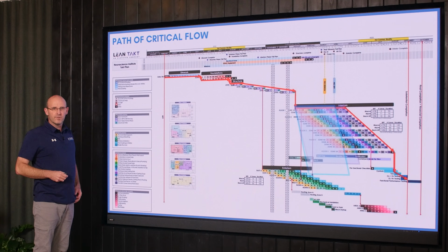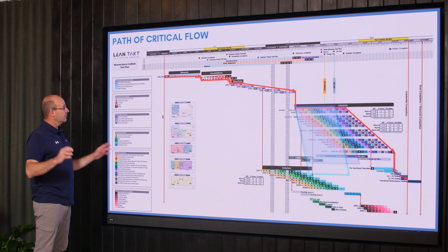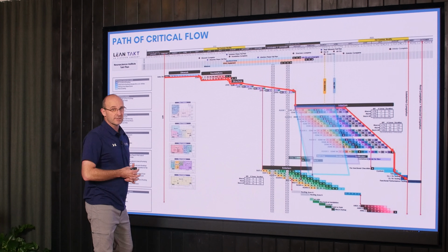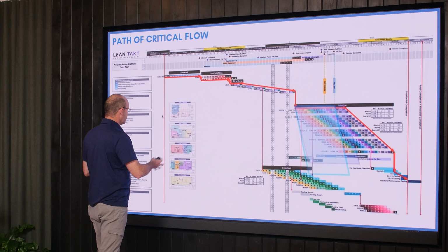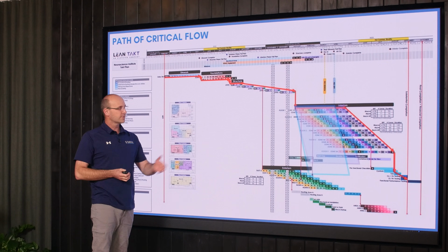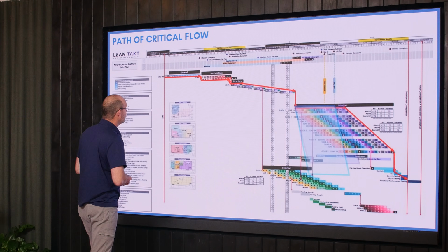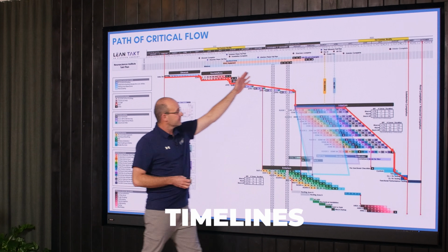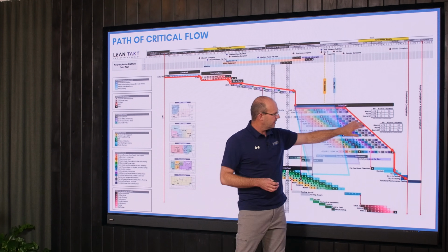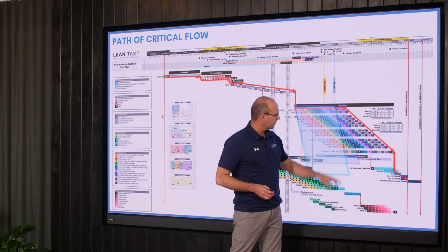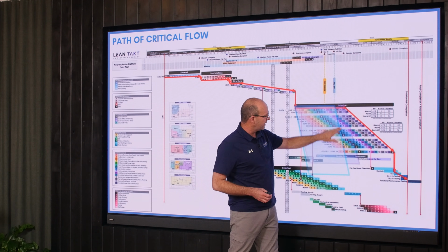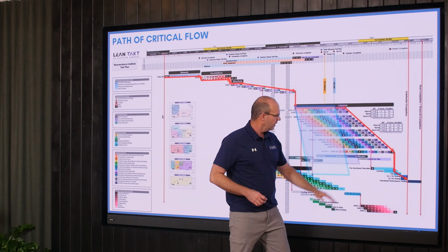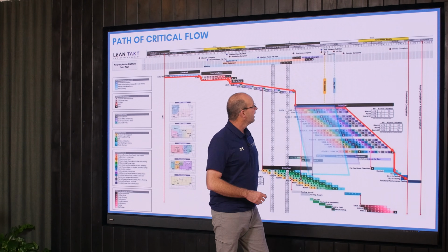And one of the things that I want to say as I'm closing this out, which is very important, we got one more video after this that'll be brief. But the takt plans that you see should no longer just look like some random pretty thing that somebody created. They are timelines with a promise to the owner, the ability to go faster during the pull plan, and a backup zoning strategy if we need it, where you have buffers.